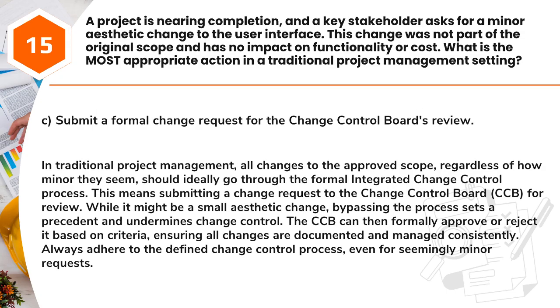Answer: C. Submit a formal change request for the Change Control Board's review. In traditional project management, all changes to the approved scope, regardless of how minor they seem, should ideally go through the formal integrated change control process. This means submitting a change request to the Change Control Board, CCB, for review.